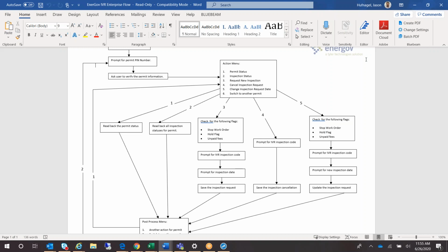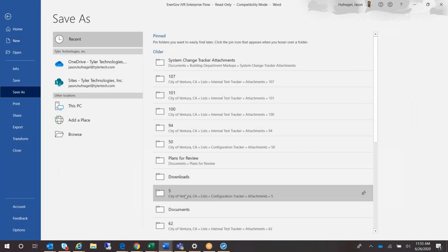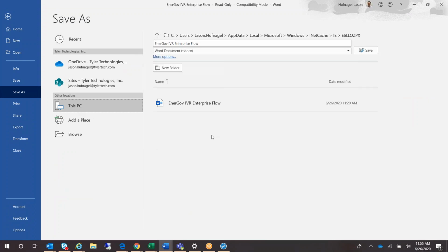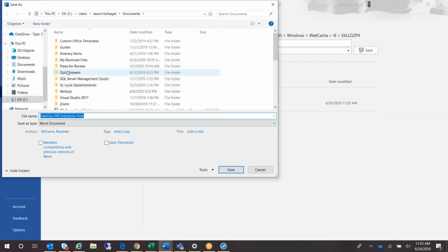Yeah, so I think we probably need to include this in the go live. All right. Okay. So I've gone ahead and recorded that IVR will be included in the CSS e-review go live. Payments will come later. The next steps are to identify the greetings and voice recordings that will be added, and to identify and work with Fire, BNS, and Public Works to come up with the IVR numbers for inspections.